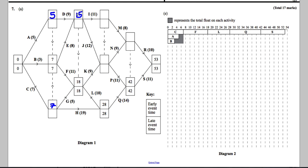How do we get to the next node? It could be 5 add 9, or it could be 7 add 8. Seven add 8 is 15 and 5 add 9 is 14, so we go for 15. What about the next? It's 15 add nothing giving 18, or 7 add 11 is 18, which is bigger than 7 add 5 giving 12. So that's 18. Then it's either 15 add 12 = 27, or 18 add 9 = 27, so we go for 27.